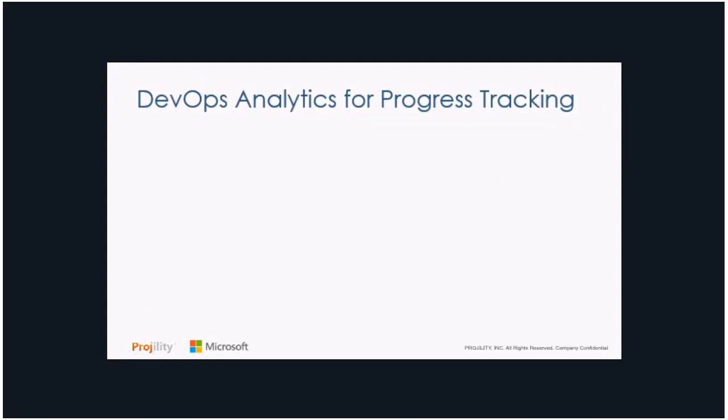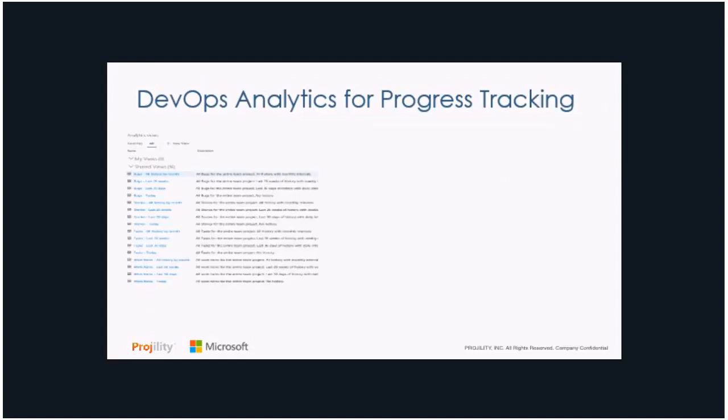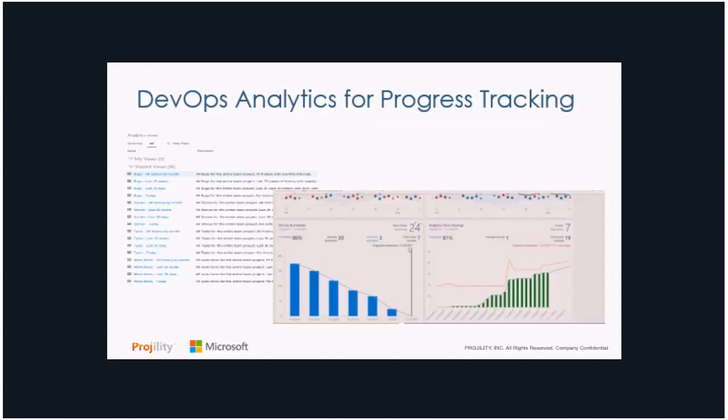So from here, the good news is we have lots of analytics. Within DevOps, we have an analytics bolt-on that lets us drill down into work and status and activities being done over a point in time. We can look at 30, 60, 90 days. We can look at sprints and burn downs. And we're going to have charts. So you can see we're going to have a sprint summary. We're going to have a burn down. We're going to see how many sprints we have active, how many features and stories we're working on. We're going to see the epic and the feature train at the top. So it's all going to be there in Azure DevOps, all the reporting we need to do our day-to-day management. We don't leave DevOps for that, and that's fully integrated.